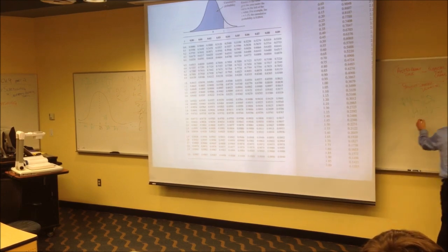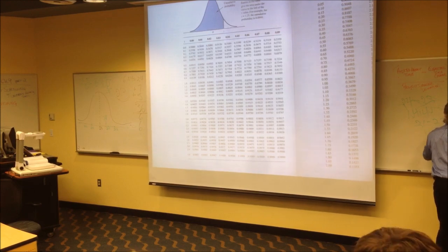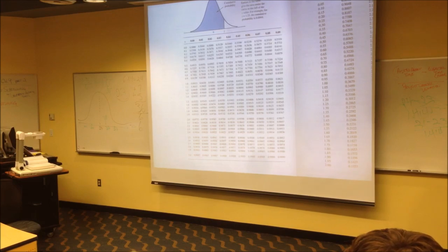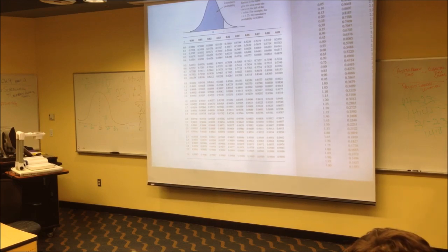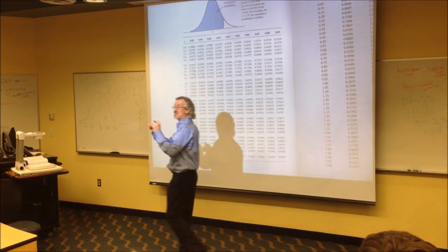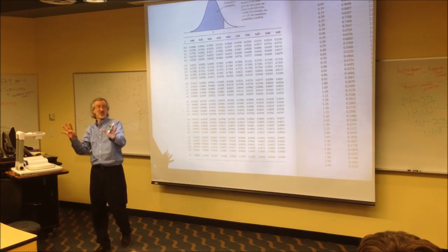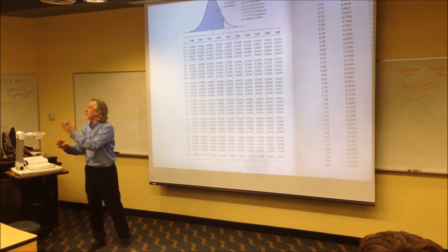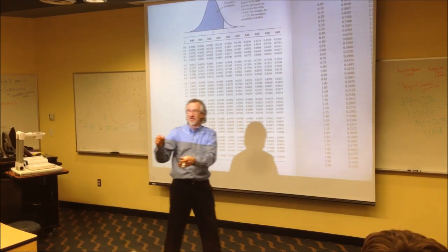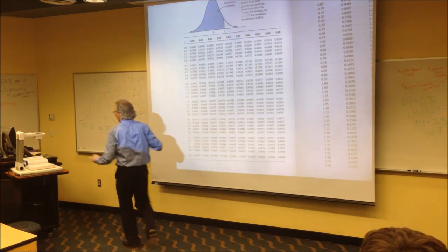Follow this rule. 21 minus 23 divided by 1.414, hit me with a Z, equals negative 1.75? When we look up negative 1.75, that's going to tell us the probability it's going to take that amount of time or less. The question said, what's the probability you're going to get this done early, which means that amount of time or less, but I'll be more specific on the test. I'm not going to leave you hanging. It will say, what's the probability it will take 21 units of time or less? You've got to go to the negative.